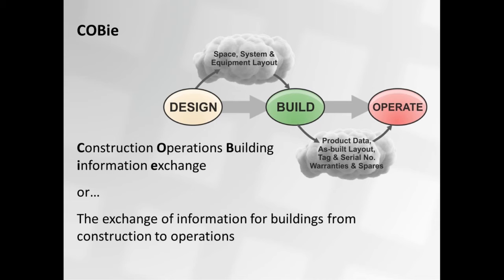So there is no strict formulation of who should do that, but in your BIM execution plan, you are going to tell the client who is going to take that responsibility, and the client needs to believe that that is feasible and agree to that at the pre-BEP and post-award BEP and sign that off.